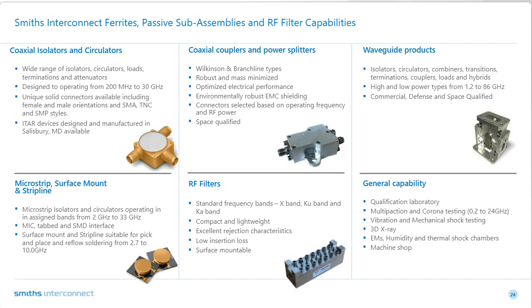If you put that across the entire spectrum for a handful of components within a multifunction assembly, I'd say you're in the plus or minus $10,000 area. And if you're talking about the example we had of maybe the 20 component package or 23 component package, you're probably speaking in terms of more in the $50,000 plus or minus package overall, if I had to give a rough order of magnitude.